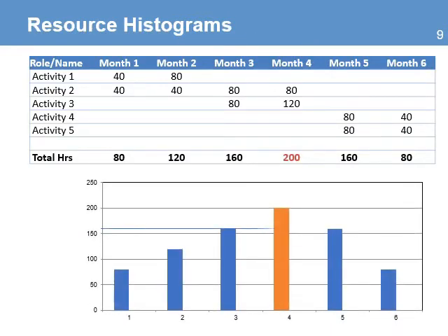An important tool to use during the implementation phase is the resource histogram. This is a chart that maps the number of hours each team member is assigned in the project. Ideally, each team member assigned to the project is expected to work full-time, but the reality is that some will work more hours than others. As you start assigning the work, you will start noticing that some people have been asked to work more hours than what they can work on a regular day.